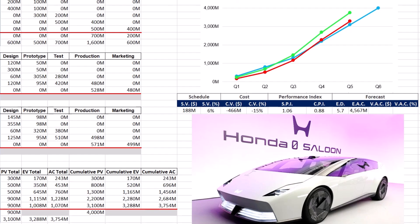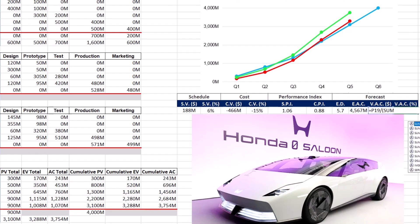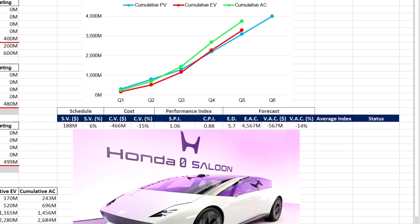Variance at completion or VAC is the difference between the sum of planned values over 6 quarters and the EAC, showing whether the project is expected to be over or under budget in monetary terms. Variance at completion in percentage normalizes the variance — calculated by dividing the variance by the sum of planned values, it is minus 14%, which allows for benchmarking cost performance against other projects or industry standards. For an integrated performance assessment, we can find the average of SPI and CPI: an average index of 0.97 suggests the project is slightly underperforming. While the project is ahead of schedule, cost overruns are significant enough to bring the average below the optimal level of 1. The project is progressing faster than planned, but cost inefficiencies must be addressed to avoid further budget overruns.